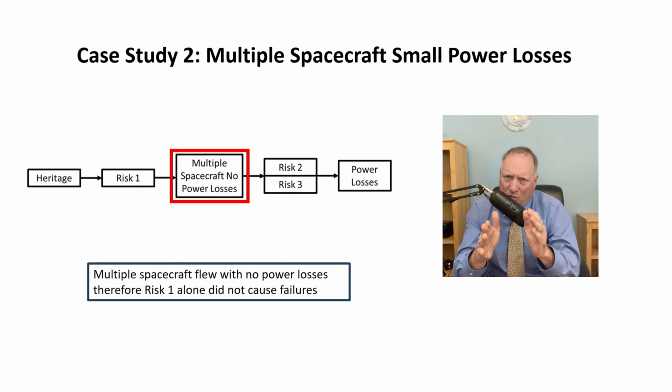Though the changes at risk 2 and 3 by themselves seem subtle and were easily approved, that slight change shifted their data sets, or Venn diagrams, to now overlap with some data points in the previously dormant risk 1. In other words, it took the changes at risk 2 and risk 3 to expose risk 1, which when combined could cause product failure.